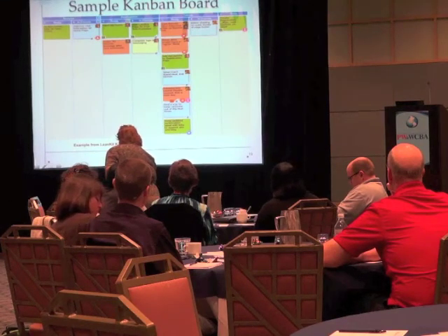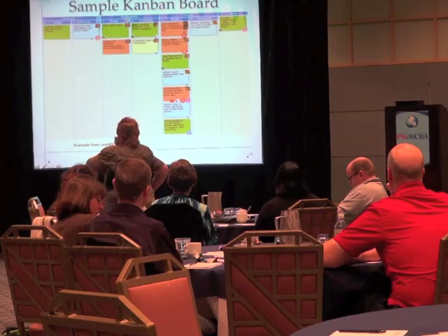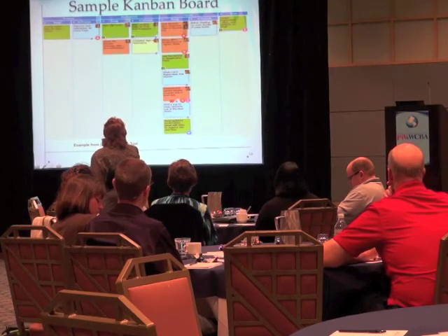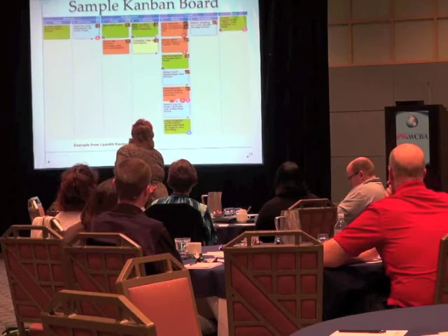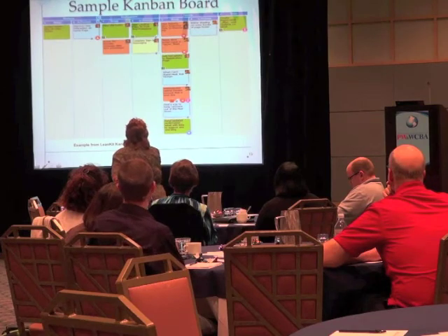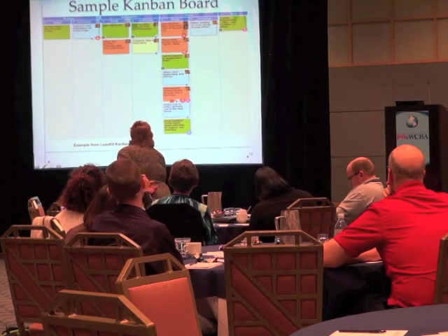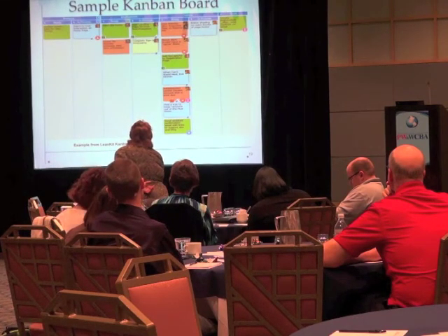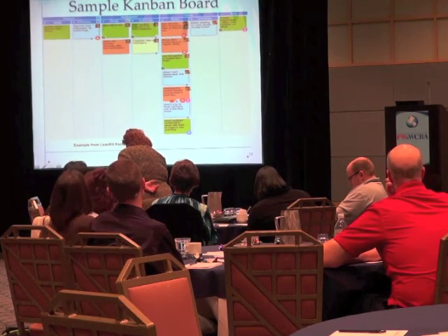Where'd it go? See these? This number here, number 7? This is the width limit for this ready queue. Whereas over here, here's the limit for things that can be in analysis. And of these 4, 2 of them can be in process.